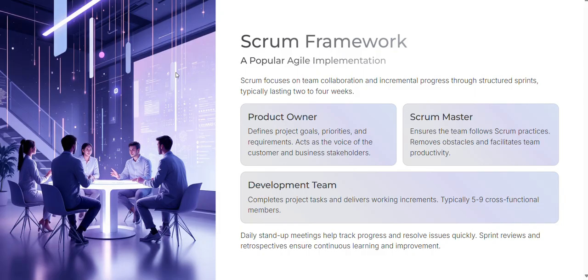They complete project tasks and deliver working documents and working increments. Typically there are 5 to 9 cross-functional members. Daily stand-up meetings help to track progress and resolve issues quickly. Now sprint review and retrospective ensure that continuous learning and improvement are done within the team.